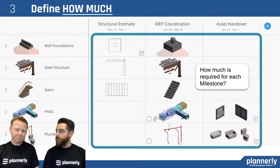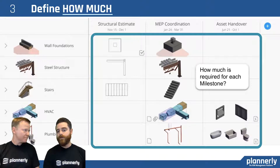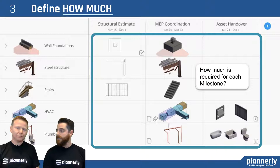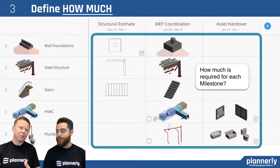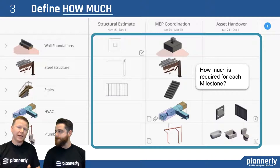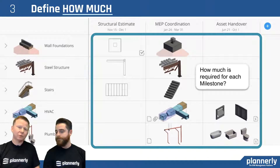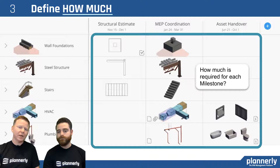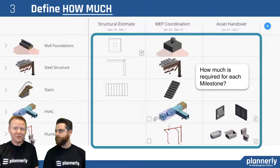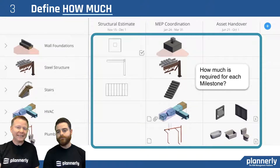Defining when is very important because you don't have to spend that time up front, and you might not have that information up front. So aligning those expectations would prevent a lot of headache. Putting things in the model too soon — even though it might have a use at some point — if you put it in too soon, it might cause a lot of rework downstream. Understanding this progression is really important, and making sure that you model it once rather than multiple times at multiple levels of geometry is usually the least wasteful, most lean approach.